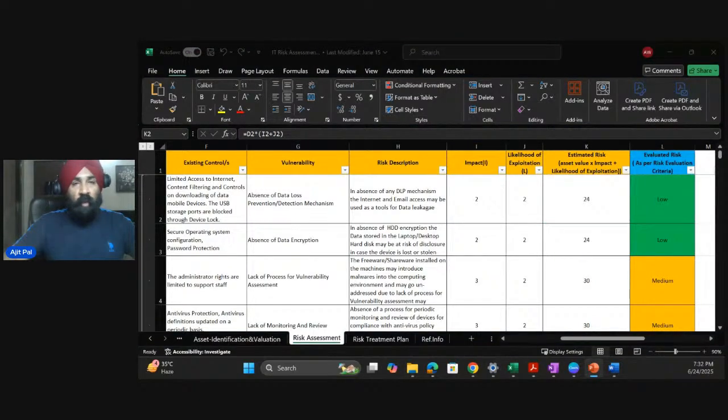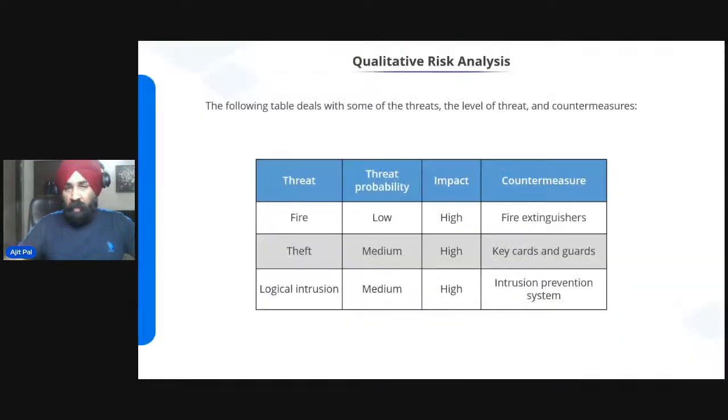So you can see, as a result of qualitative risk analysis, you can find out the threat, probability, and impact, but here we are seeing ratings. If you give these ratings numeric values, it becomes semi-quantitative. A lot of times I have seen people arguing with me that when they see numbers, they say, oh, this is quantitative. I said, no, this is not quantitative. This is qualitative, semi-quantitative, you can say. It's ultimately qualitative where you have given numbers to it.